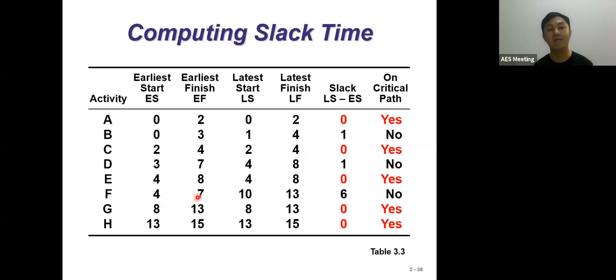Therefore, late finish minus early finish gives the same answer as late start minus earlier start. I hope you understand this part.